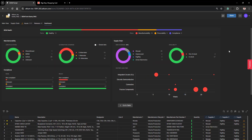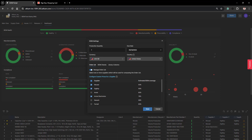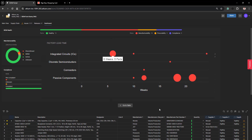The most exciting chart I find in the dashboard panel is the factory lead time. This is a great view of your design and your project and where it stands. Before considering this, you want to note that it is all driven by your BOM settings and the due date that you have set there. That due date is placed into your component list and it identifies those components that fall outside of that due date criteria, placing them on the chart based on their expected arrival time.